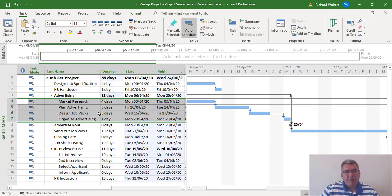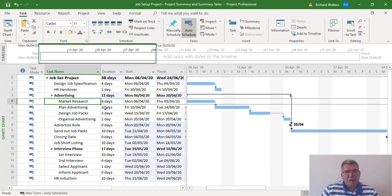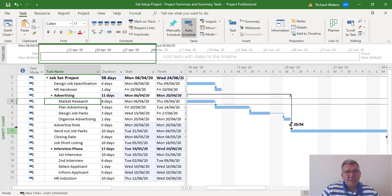The four days has been added, so it was seven: three plus three plus one is seven, plus the four is eleven. So that's working correctly. And all I'm going to do now is join two and three, and seven and eight.